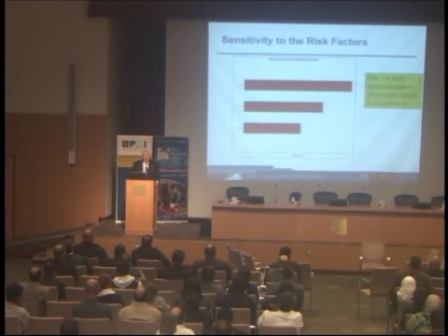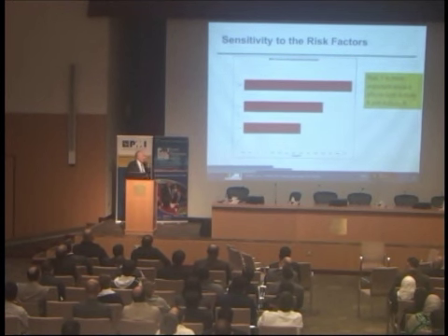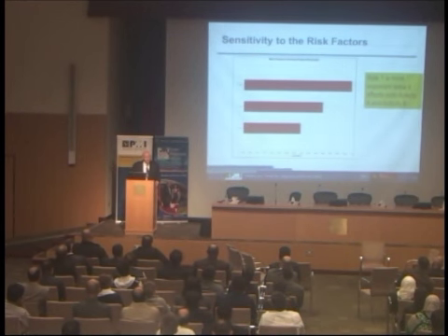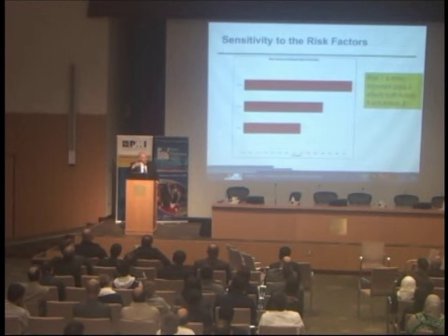But you've got to remember, this methodology of fixing up a sensitivity graph is based upon how the risks are correlated with the finish date. Correlation coefficients have something to do with the mean, right? Squared differences from the mean for one variable versus squared differences from the mean of the other variable. I don't care about the mean. Sorry, I don't care about the mean. I care about the 80th percentile or 70th or 90th or whatever your target is, but it isn't the mean, or it doesn't have to be the mean.